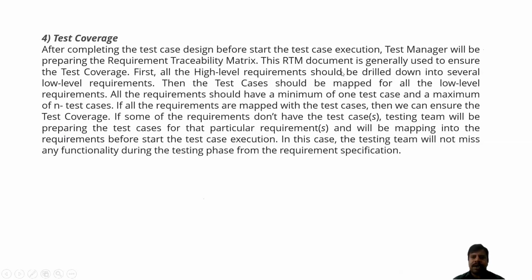First, all the high-level requirements should be drilled down into small low-level requirements. Then the test cases should be mapped to all the low-level requirements. All the requirements should have a minimum of one test case and a maximum of n test cases. If all the requirements are mapped with the test cases, then we can ensure the test coverage.